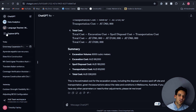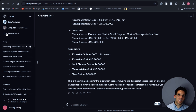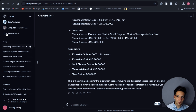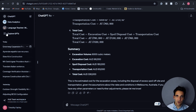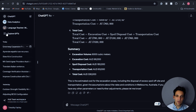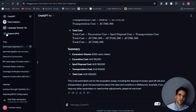For this it used basic cubic meter rates, but we could then tell ChatGPT we want a first-principle self-perform rate based on a crew of labor, an operator, and a truck driver. We could give it rates for these different activities, and overall we could tailor the estimate to exactly what we want. You can see the power of the calculation process in ChatGPT.